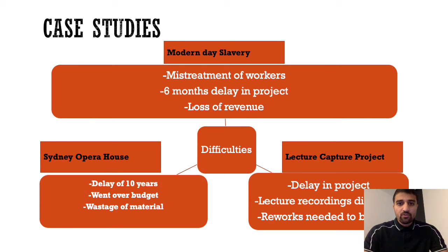The last case study would be the lecture capture project. This faced delays because of various reasons, such as the rooms actually being used by the students when in the system they were shown to be vacant. Another reason was the rooms couldn't be unlocked. Many of the security guards were actually not informed previously of the whole project as well. So there were various reasons for the delay in this project. The lecture recordings were disturbed because of this, and reworks needed to be done as well afterwards.